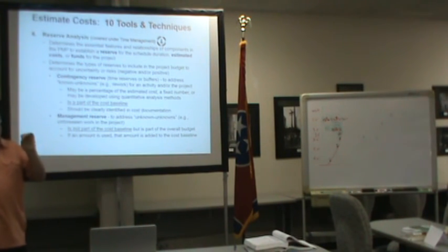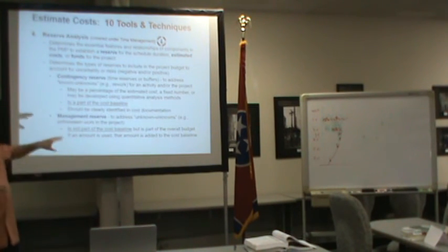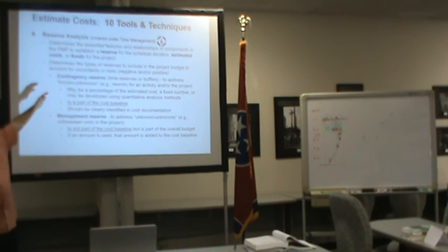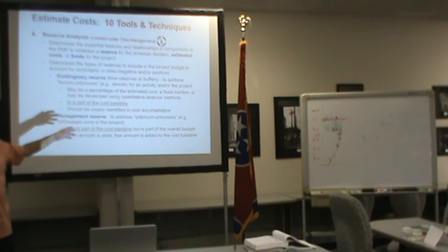When we do budgets, you end up with 2 reserves, a contingency reserve and a management reserve. And those of you that are as old as I am will remember the vice president, or he wasn't even vice president, talked about known unknowns and unknown unknowns.